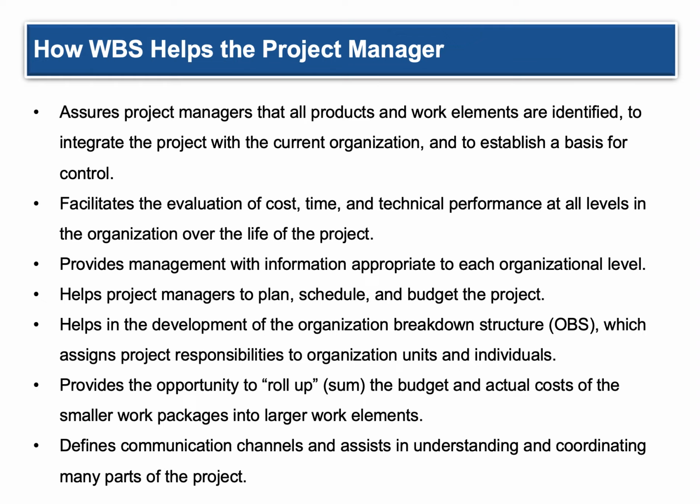Now, this is something that we're going to integrate in with the WBS. It's called the OBS, Organizational Breakdown Structure, which assigns project responsibilities to organization units and individuals. Without even knowing it, you've been doing this all along. Hey, you take this part of this milestone. You take this part and I'll do this part.